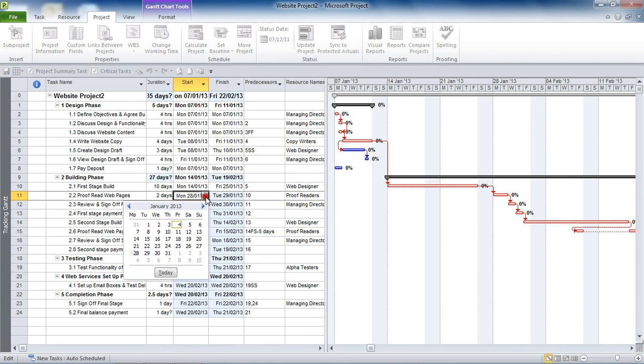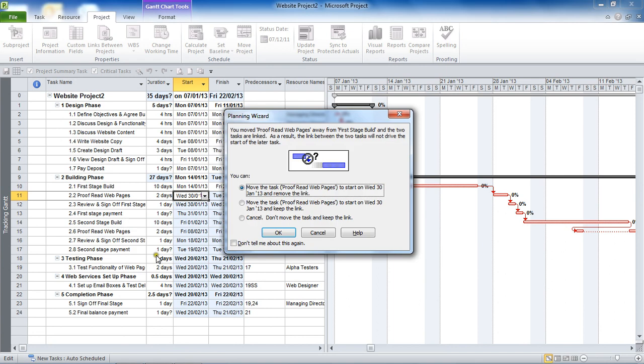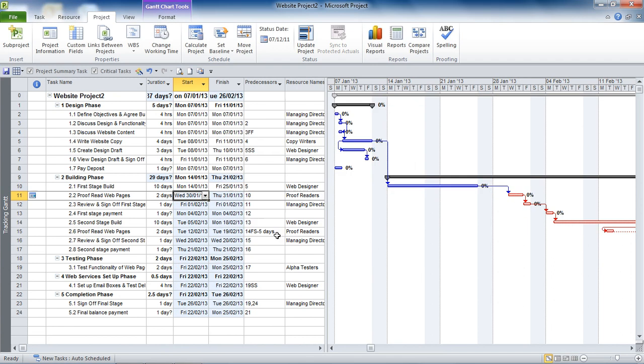If I change this date from what I'm looking at here, the 28th of January, and I'll change it to the 30th. As soon as I do that, Project's going to have a little moan and say look, you've got a link in here, it's got dependencies, I'm scheduling this, why have you put a date in? It's asking me if I want to remove the link and move that task. I'm going to move the task but keep the link and click OK.